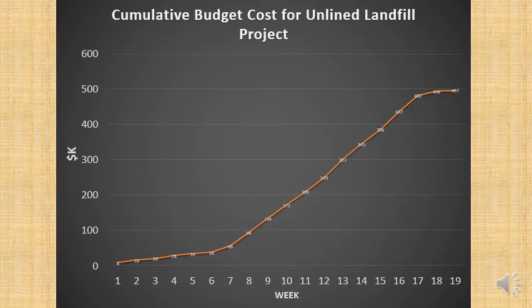Then you've got hundreds of people running around on site and lots of wages. You've got big machinery with big hire rates and so forth, and it speeds up. And then the commissioning stage, or the delivery phase, as we called it in the project life cycle section of this course, flattens out again, and it's usually quite short as well for a civil engineering project.